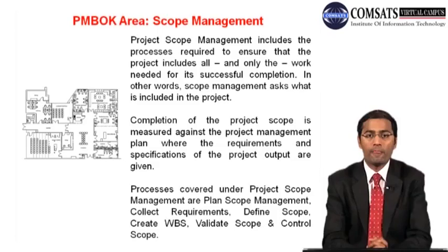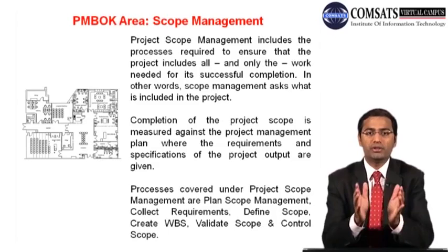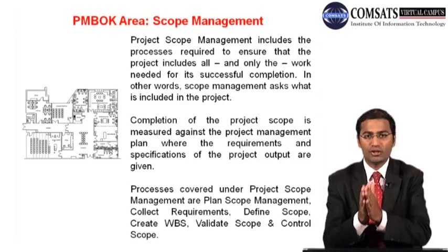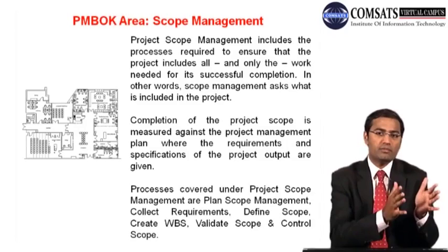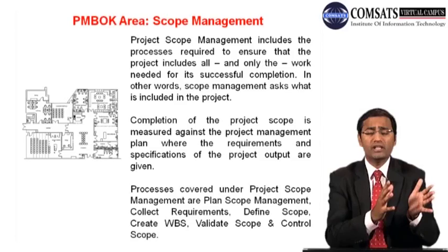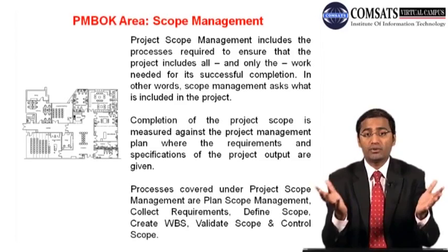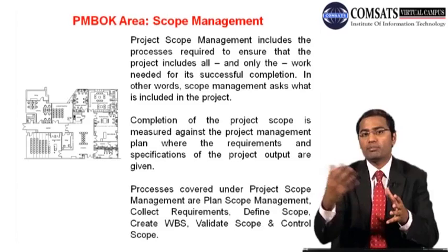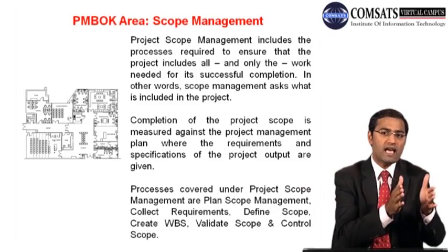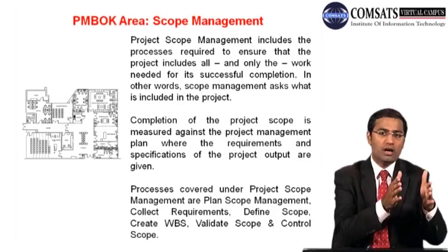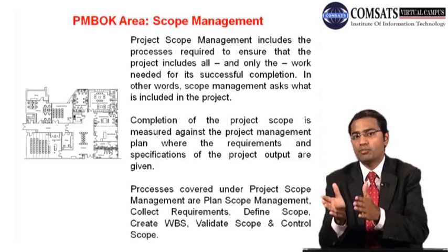But again, before making such an offer to the client, you should take up this matter with your team and perform integrated change control whether to add the scope or not. There may be a case your project team is already under pressure as far as time is concerned. So it is not always the money. Another case may be you have acquired your project team through your organization, and your organization is taking up another project in some other location, and the strategic fit of this project has fallen a bit. So first, this project of constructing a house for this client was having high priority. Now the priority has been lowered because of the organization's shift towards another project. Still, will you accept the offer of the client? No.